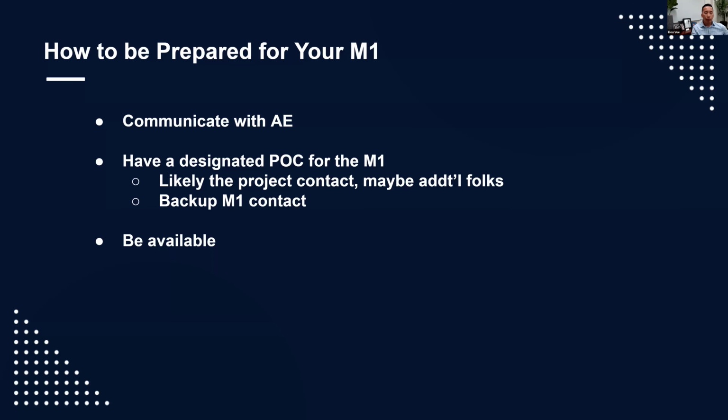And most of our customers, when they do these M1 approval meetings, do it with themselves, but they also have the IT there just in case they're the ones who are going to be loading it into the system and ingesting it. So it just helps move the process along a little faster. And yeah, it's a buy-in from all parties that whatever we're delivering is whatever you're going to be using. We want you to be able to use this M1 in whatever its final deliverable state is going to be, and have a proof of concept that yes, this is how we're going to use it in the end product. We approve it. BMI, please proceed with production from this point.